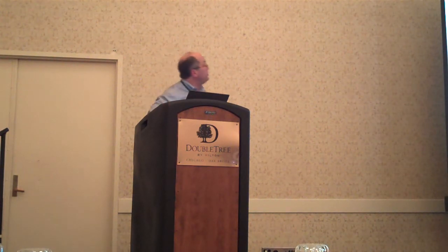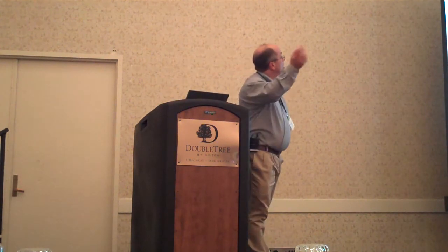All right. So this is actually a card wall. It starts off with what's in next. It goes to progress. It goes to QA. Goes to review by the product owner, and then it goes to completed. You might have a better rendition of this, but this is the team site. You notice today's events in the team cadence.